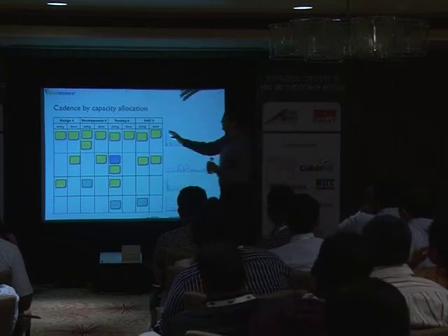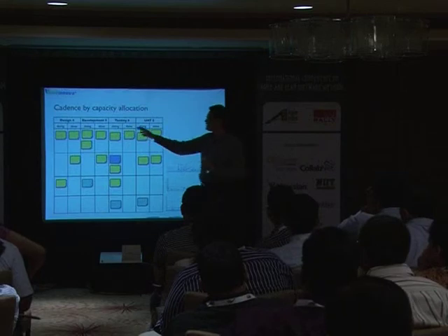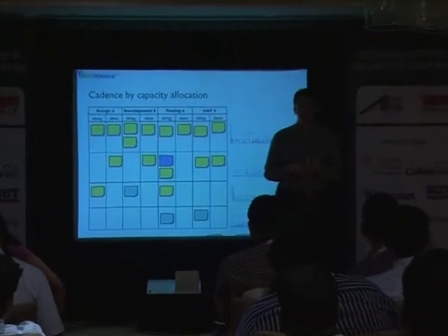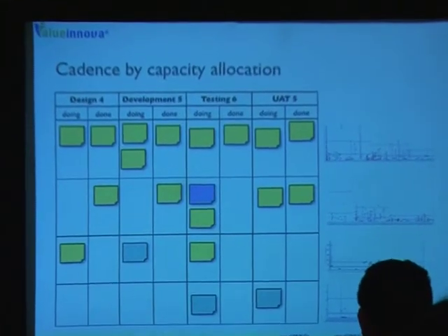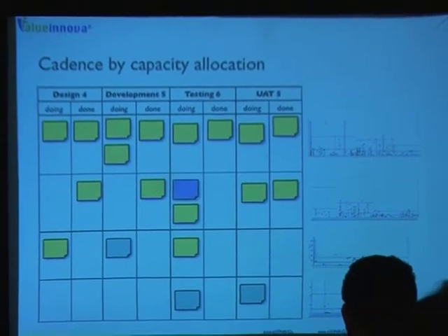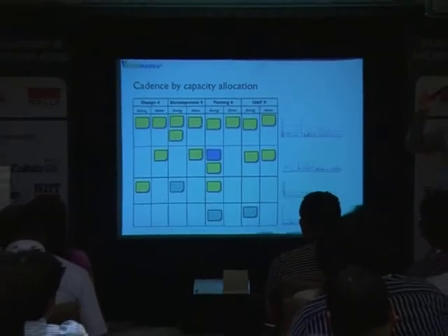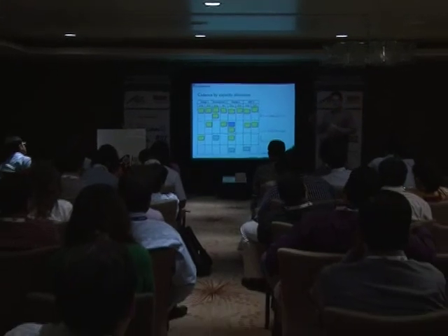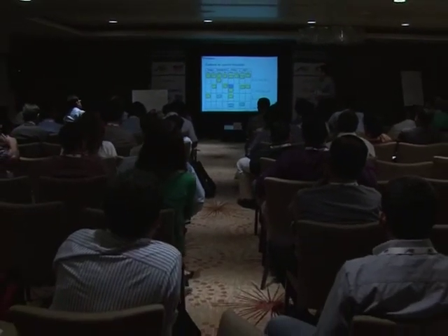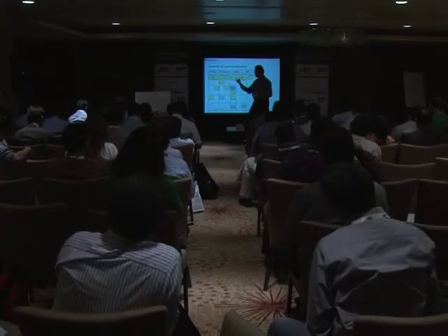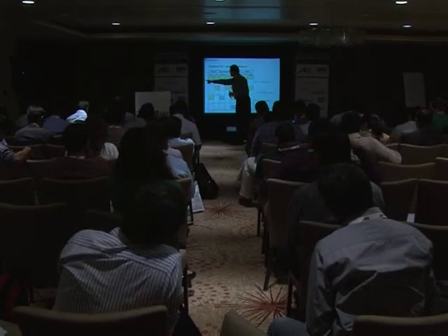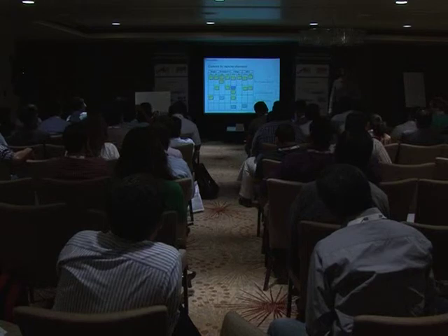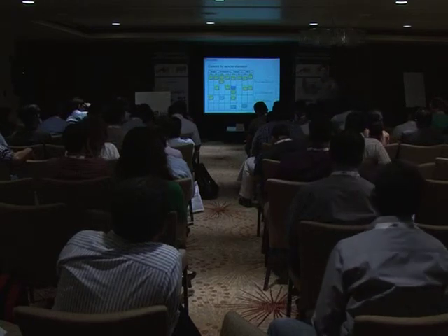So what you can do is granularize that. You can indicate, I want that for design, I can only have a maximum of 4 tasks at a given time. For development, 5, and so on. And also there's a criteria that helps us determine how to do this. There's not a magic formula as to, if you have these resources or this condition, this is the right number. That doesn't exist, because it's a case-by-case thing. But what is important is that you can make story or whatever it is that you have, use case, whatever, flow from the beginning of your process to the end of your process in the best possible way. That's what you want, because again, what matters is the delivery of value.